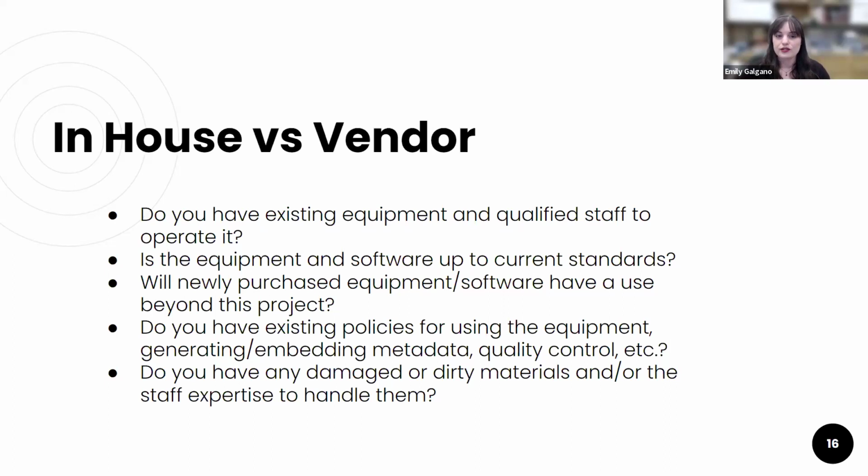Here at SHI, we've chosen to use an external vendor for all of our recent digitization projects, and I just want to go through a few of the reasons why we have chosen to do so based on some of these questions that we asked ourselves. One, we have collections that were digitized in-house by previous staff members a decade or so ago, that while they were sufficient in some ways, were not high enough quality given the low quality of the originals for transcription and translation work. This is that cassette collection I mentioned earlier where we had a sound engineer work on it. That's because the original digitization work wasn't good enough, and so we had to redigitize those tapes and get them done professionally so a sound engineer could work with them to improve that sound quality.